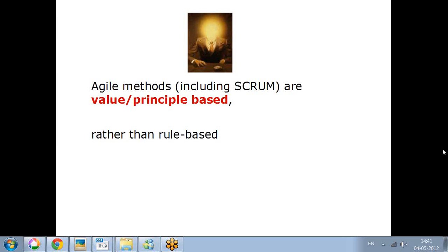Can I conclude fixed price doesn't work well with Agile? No, you need not conclude that way, because if a customer has 100 features to be developed, you can always say that for these 100 features, this is the estimated effort, and you quote. After that, if any scope change happens, you can always raise a change request. This is exactly what happens in normal fixed price projects as well. So if you make a statement like fixed price will not work with Agile, that will be wrong.